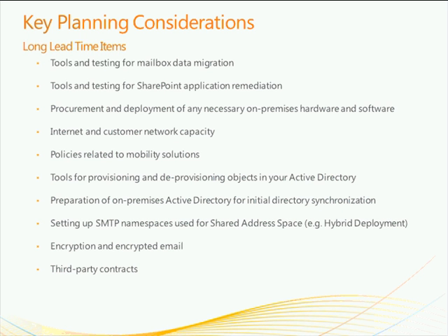So for example, if hardware or software is going to be required, how do you get that software? What's the typical turnaround time for purchasing a new server if that's what needs to happen? I would also like to call out preparation of Active Directory on premises.